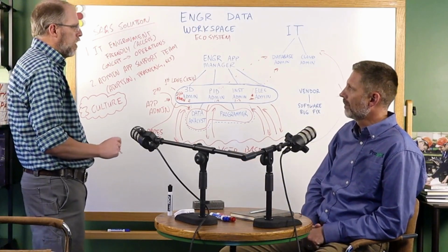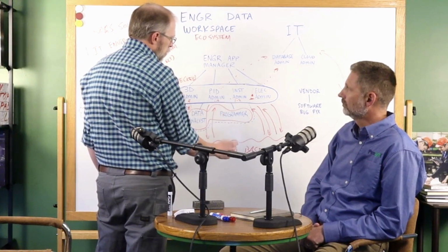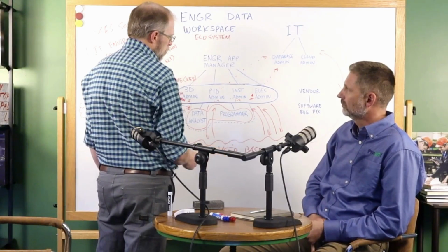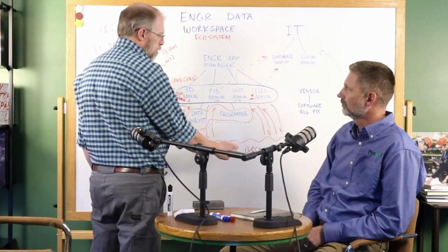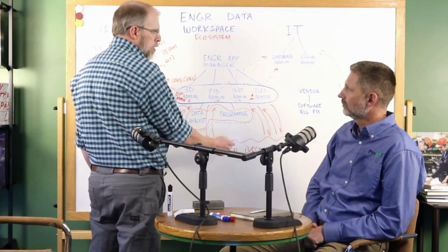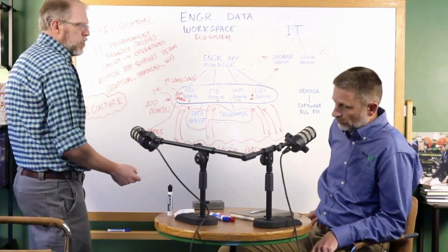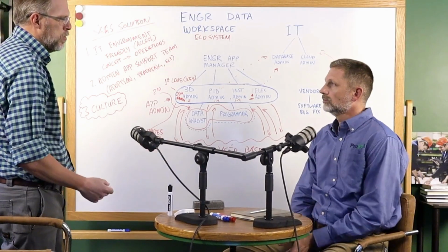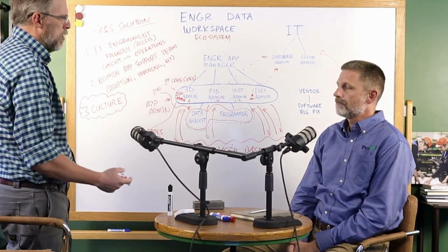Well, I agree with that. I'd also say they know what's going on with the users. So if there's a big turnaround coming up or there's a capital project going on, they know what's happening there, and they're also helping manage the information for those. Because you don't want to just go and upgrade the whole system and have a big turnaround coming up the next day. Correct. That would be a disaster.